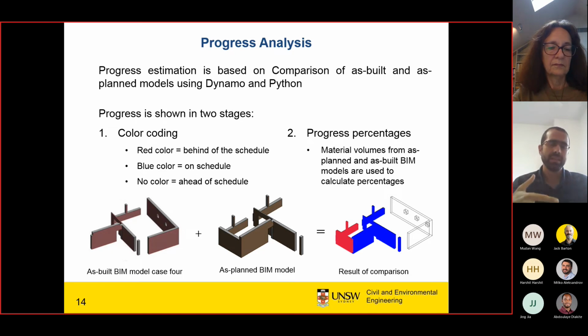That's the one thing. The second thing is cleaning the data and removing the noise from other elements, like redundant elements, when you have the scan data from a construction site. It's also very important to clean that data and extract only the elements that you want. As you know, the construction site will have different elements on the site. So that's why the application of this host of distance is a new method, we can say, that lets us extract only the elements that we want.